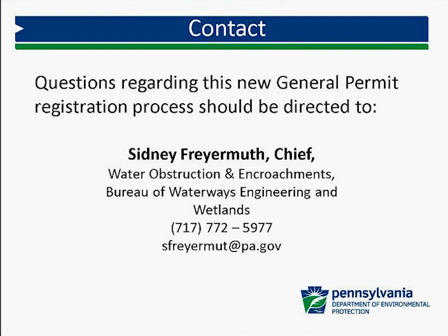Who will review E&S plans for general permits? For GP11, that's required to be submitted to the department. The E&S plan has to be submitted with the GP11, and that will be reviewed by the department. E&S plans for other general permits must be reviewed by the county conservation districts.